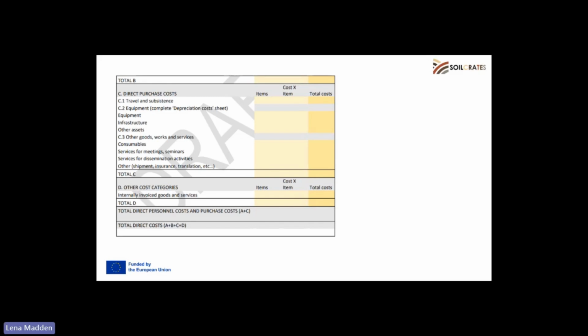Equipment to do the experiments, complete depreciation cost. What does this mean? I would potentially not advise buying any equipment unless it's something like low pressure tires, because the depreciation period is mostly 6 years, and you can only claim depreciation cost.